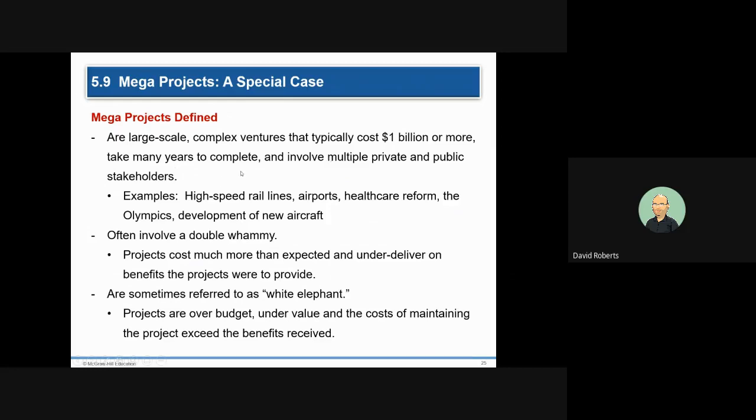Mega projects, big dollars, they also tend to have really big timelines that are longer, and they can lead to big errors. That example that I used where the $2 billion project became a $5 billion project, that's not unheard of. Shell Oil a few years ago had a $2 billion project. By the time they got done, it cost them double that. It cost them 4.